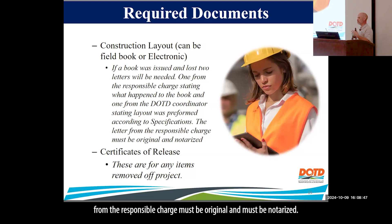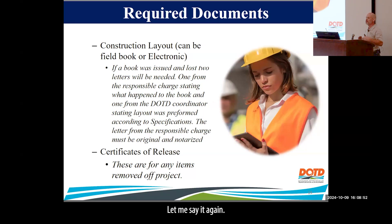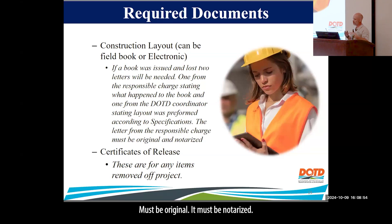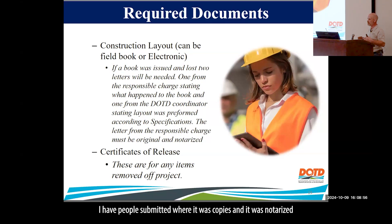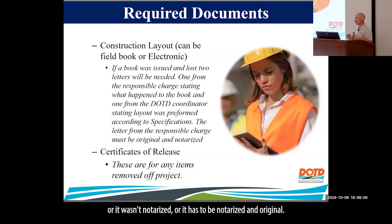The letter from the responsible charge must be original and must be notarized. I have had people submit copies, or submit letters that weren't notarized. It has to be notarized and original.